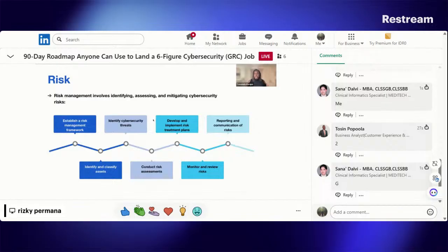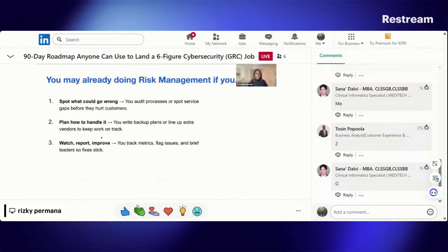Depending on the organization's context, you understand what the threats are, and then conduct a risk assessment to say how big this is. Is this really a threat, or is it only impacting a small part of the business? Then you come up with the trade-offs if we choose to go ahead with this. And if the risk does turn out to be what we thought, what controls are we going to put in place to make sure it doesn't end up more outsized than we thought, and then continuously monitoring for new risks.